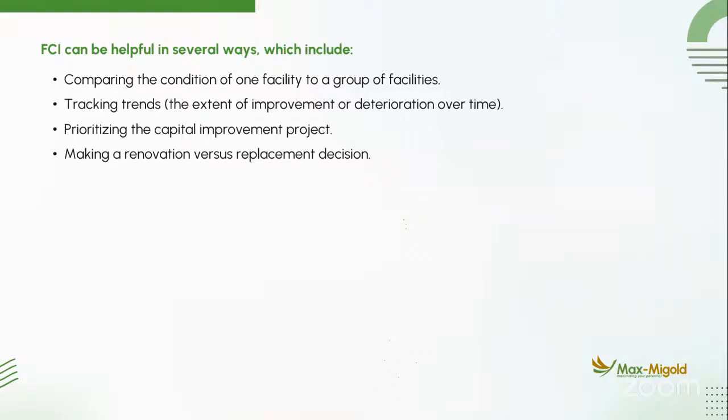Then it also helps you to prioritize the capital improvement project. So you know if you are to spend money on a capital project within that facility in terms of getting the whole facility upgraded, or you have to do what we call an outright replacement, make a renovation versus replacement plan. So when you have the two costs at hand, you can decide either to replace or to upgrade that facility.